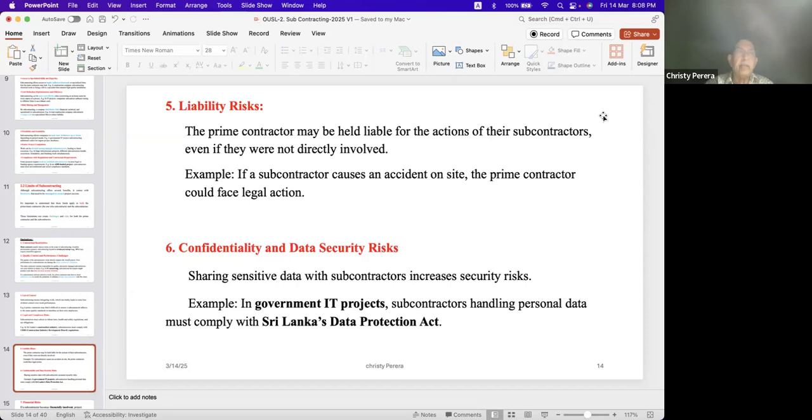Some subcontractors might not pay liability, because we have a liability risk and all these things signed in the agreement with the main contractor. But when he takes on subcontractors, he also has to be very careful. He will have to sign an agreement with all subcontractors covering all these risks and liabilities.